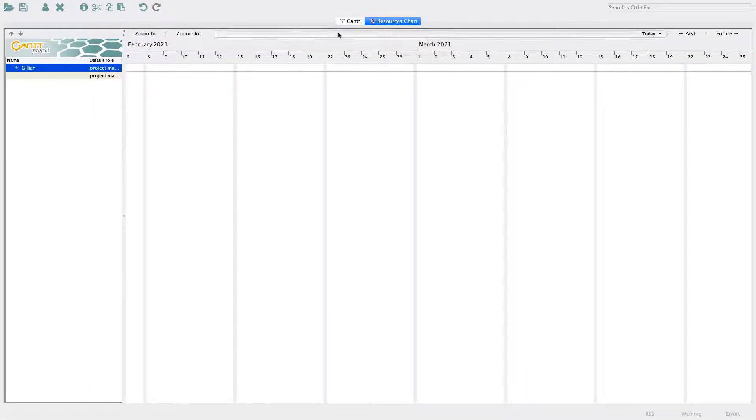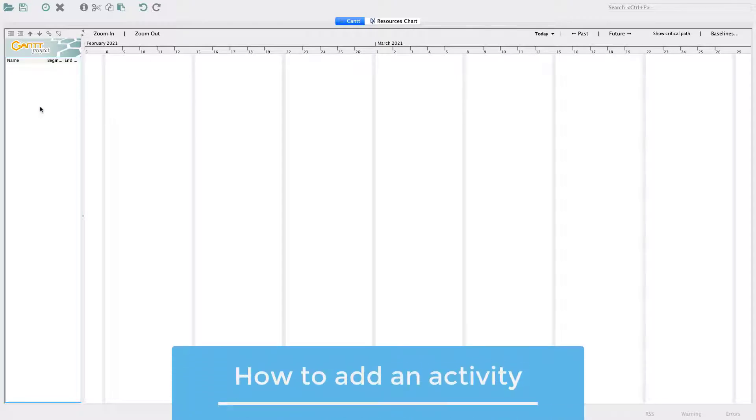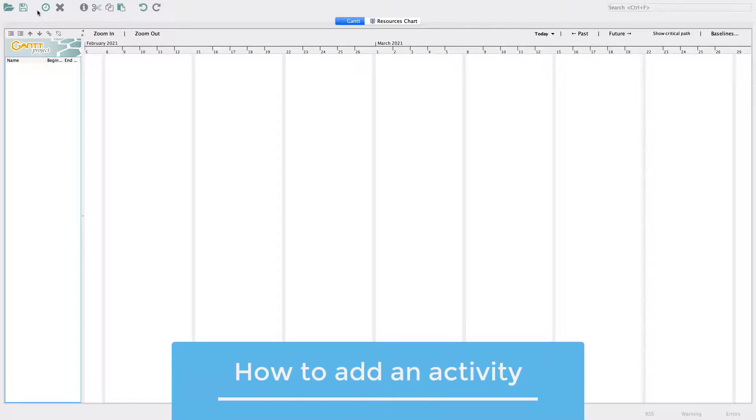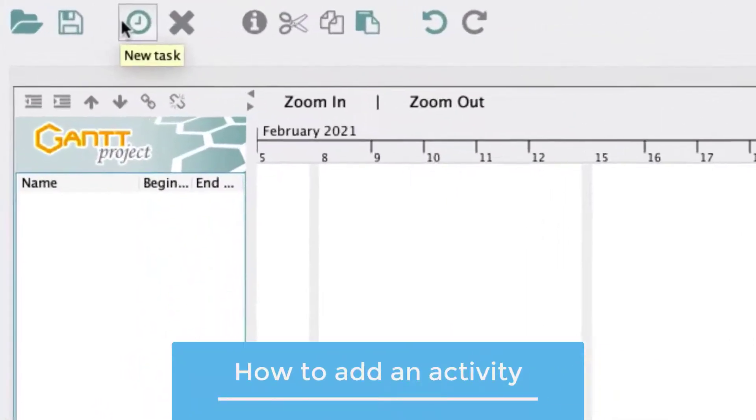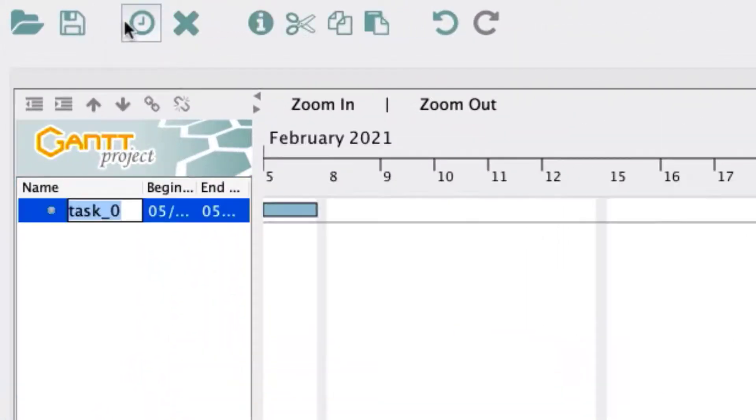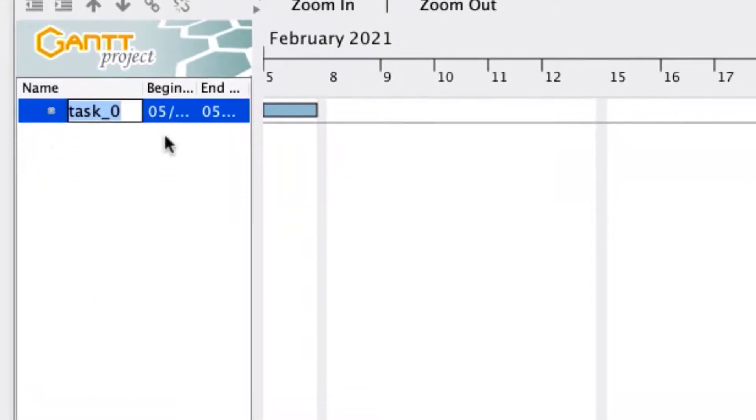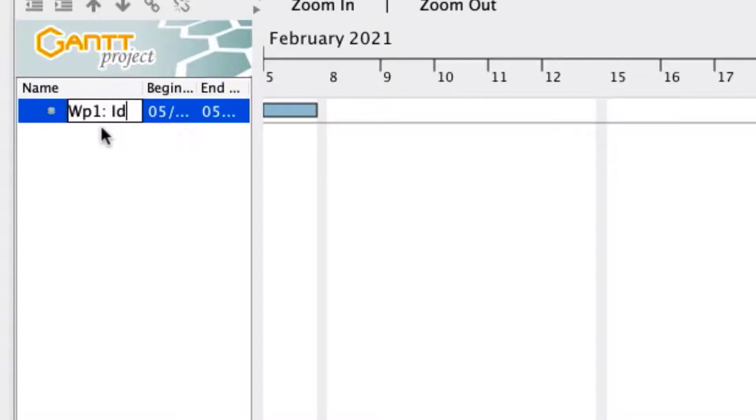Return to the Gantt chart by clicking on the Gantt tab. Let's add our first activity to our Gantt chart by clicking on the clock icon on the menu bar to add a new task. On the leftmost column of your screen, you will see that a new task has appeared. Rename this task to Work Package 1, Ideation, by typing in the task field.